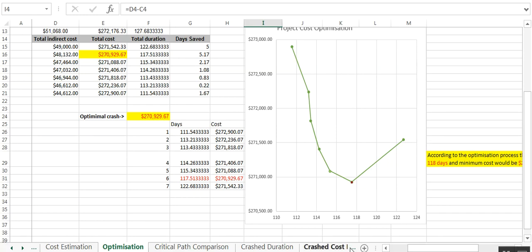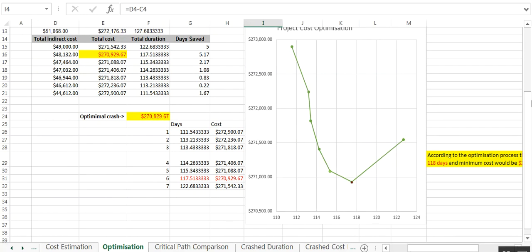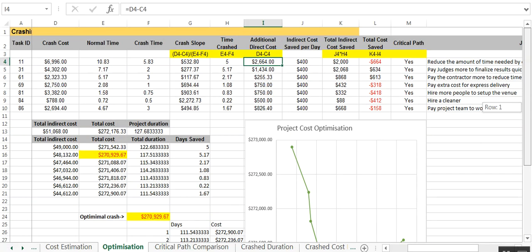Good, but again, even a good one like this, there are always some points where a bit of clarity can be added. So generally the logic is fine. Again, this is why the working out matters. The working out's fine. A couple of slight faults in the logic, I think, given that this is on the critical path. They're all on the critical path. That's the lower amount. That's what we do first. We will probably crash per day rather than crash by bundle.